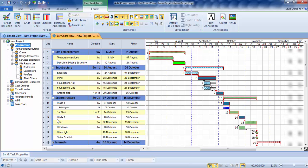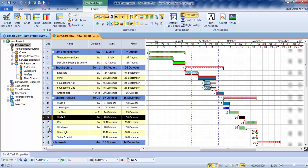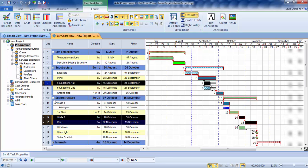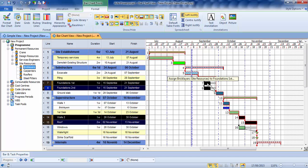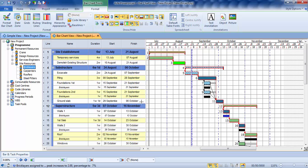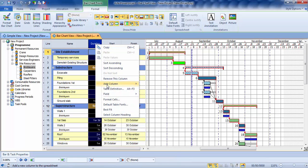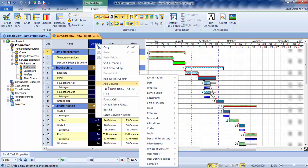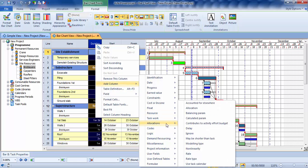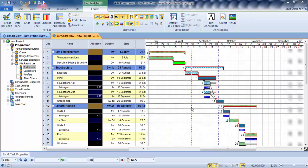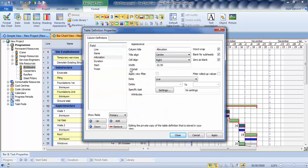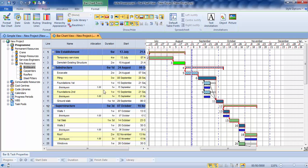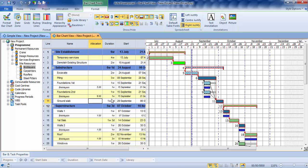If I was going to allocate bricklayers to more than one task at a time, I can hold the control button down as I click on walls, roof, and perhaps I'll do some foundations as well up here. And then go across to bricklayers, click and drag and drop onto the tasks. And they show underneath. Now as to how many bricklayers are working on this task, what I need to do is just add in a new column as I showed you on the previous clips. So right click, add a column, go down to allocations, allocation, table definition pops up for any changes you need to make. There's no changes needed this time. And we can now see how many bricklayers are being used. So I can go in and change that to say five there. I'm going to use nine there, four there, three and two there.